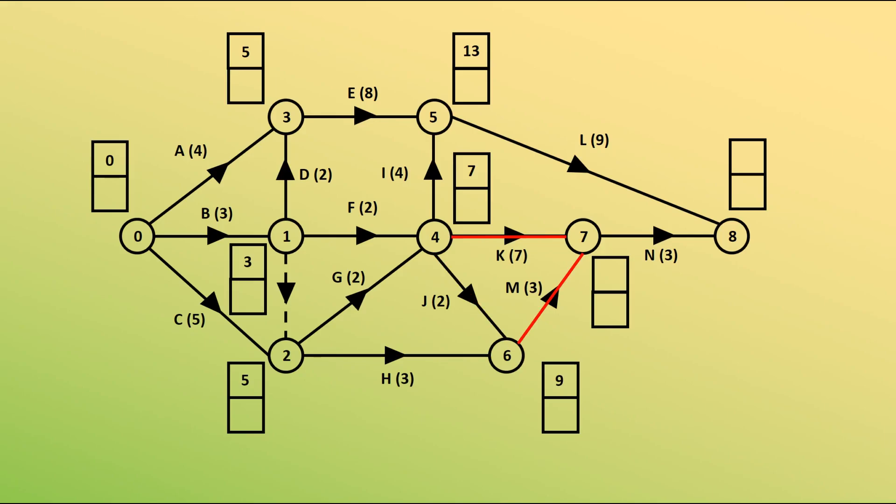Node 7 has K and M going into it. We want the time from node 4, which is 7, plus K is 7, so 14. Or 9, the earliest time to be at node 6, plus 3 is 12. The larger value is 14. And finally, we have node 8. 14 plus 3 is 17. 13 plus 9 is 22. The larger of those two is 22. So now we know that the shortest time we could complete this whole activity network is a time of 22.